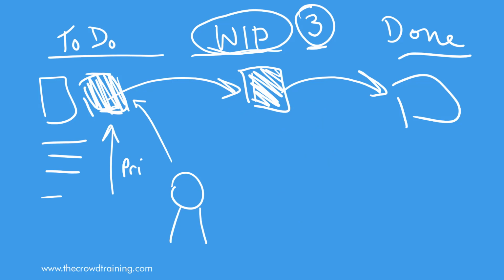This is the most simple, most basic Kanban board that's possible, because that's really at the core what you need. But obviously, depending on the work that your team is doing and how things need to be organized, and maybe any of the gates that work progresses through as it goes from the point it comes in to the point that it comes out, you may want to put more columns in a Kanban board.